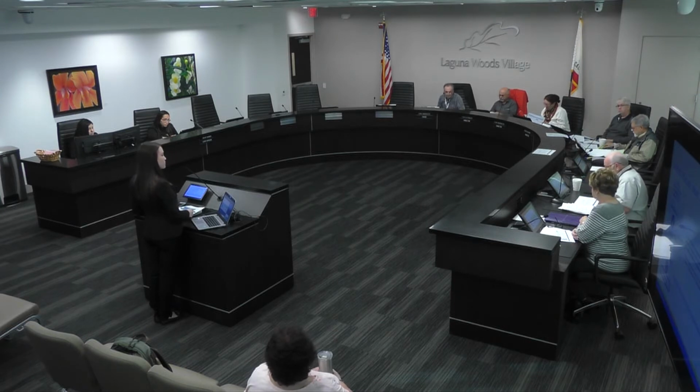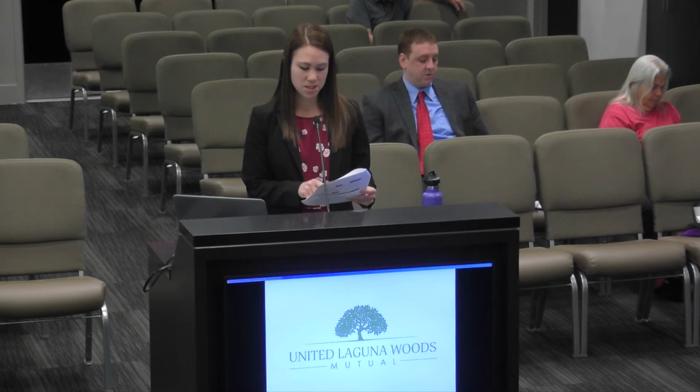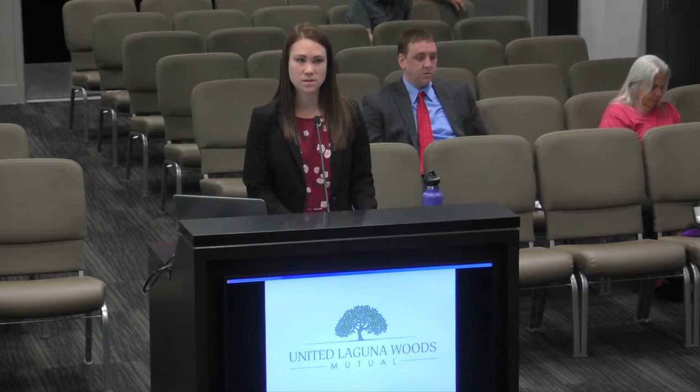I'm sorry, I have a couple of questions. You're not telling me right now that a rough order of magnitude estimate is what you gave us, and it's plus or minus 10%, right? Because rough order of magnitude is plus or minus 30 to 50%. What's shown is based on a 10% contingency added to the total cost. So that's a plus or minus 10% estimate, which is not a rough order of magnitude estimate.